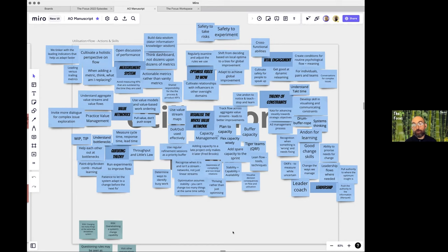Now, one technique that many teams use is this idea of using story points. The concept is that every item in the product backlog gets accorded a score in story points. And therefore, one item might be 3 story points, one item might be 2 story points, one item might be 5 story points, one item might be 1 story point. And then at the end of the sprint, we count up which items we got completed. Okay, we've got 3 items completed. Every single item was 2 story points. Therefore, 2 plus 2 plus 2, that makes 6 story points. Okay, cool. So that essentially says in this sprint, we accomplished 6 story points. Now, that essentially tells us our capacity for a usual sprint is about 6 story points.